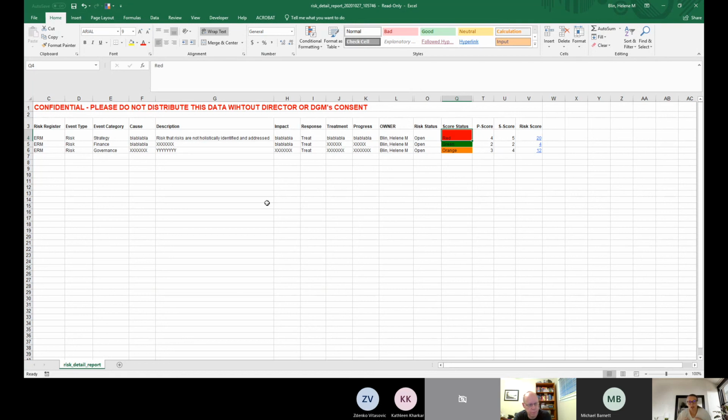So again, you may want to become more sophisticated in your risk register, but the risk, cause of the risk, impact of the risk, score of the risk, mitigation, and risk owners. If you had only 6 boxes, those are the boxes I would recommend. And of course, if we are talking risk and opportunity in your company, you want to identify if this risk is a risk or an opportunity.